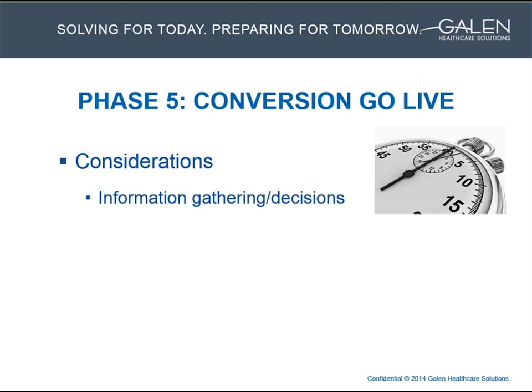For example, in my last conversion, we uncovered a theme with the legacy EHR data where many free text entries of all different types of clinical data was permissible. And these data elements each had a unique code and description, and this made them very difficult to map over to a discrete entry in the target system. So after much review and discussion, part of the solution led to technical work in the form of creating a conversion summary document that could capture certain results data and then would display in the target EHR as a scanned document on the patient's chart. And this decision, in turn, uncovered the need to support staff and end users on the conversion data specifically because it was different.